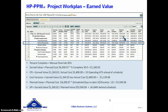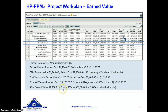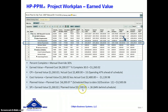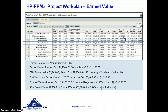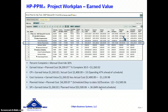The Schedule Performance Index (SPI) is an attempt to take the difference in values and variances and determine how far off schedule you are. It takes the earned value of $1,260 divided by the planned value of $3,500, indicating we are 36% on schedule — or 64% behind schedule. This assumes the same cost profile every day, and there are many reasons you wouldn't have that. For example, if you had non-labor costs and paid for all materials on day one, you don't have a flat profile — you'd start with a negative variance but your daily rate would decrease, and at the end of the task you may be exactly on schedule.